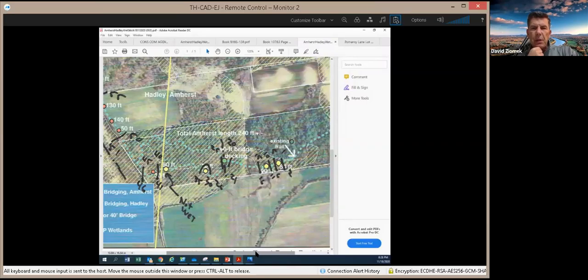And just so the commission knows about the Podick section, which was in the original application and was removed, we won't know what the trail looks like to the north on Podick until the beavers are removed and the water recedes, because that trail for most people, I know I've walked it and actually took off my boots, and Pete walked right through there. But there's a good 4 to 10 inches of water probably in that large ponded area, where there used to be a stream crossing with a couple of culverts. We'll have to wait until the beavers are removed and the water comes down to see what the condition of that trail is. Will we need to redo that stream crossing?